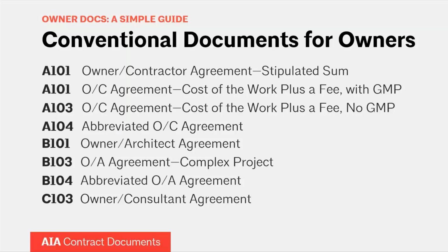There are some other more detailed differences, such as, all these documents allow the contractor to request evidence of the owner's financial arrangements to pay for the work prior to commencement of the work, but only the A201, the larger one, allows the contractor to request that kind of data after, pardon me, after the work has actually begun, but only in certain circumstances.